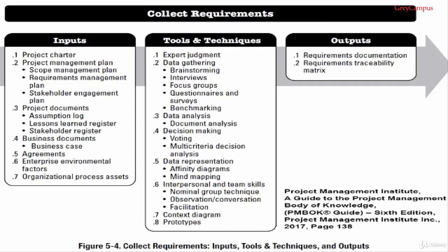Requirements analysis, so they can make sense of what they uncover. Requirements documentation, so they can record the list of requirements. Project requirements in previous similar projects, so they can apply a reasonableness check to the requirements and perhaps even suggest missed requirements. Diagramming techniques, so they can present the information in a meaningful way. Facilitation, so they can assist stakeholders and the team to work together efficiently. And conflict management, so they can prevent the stakeholders fighting over requirements.